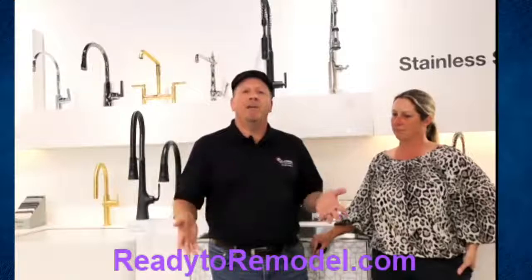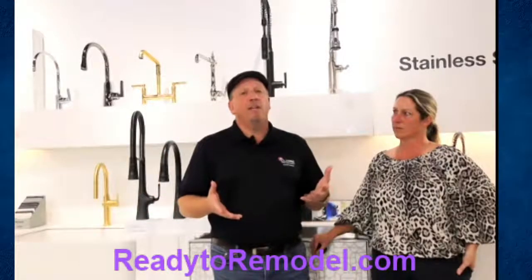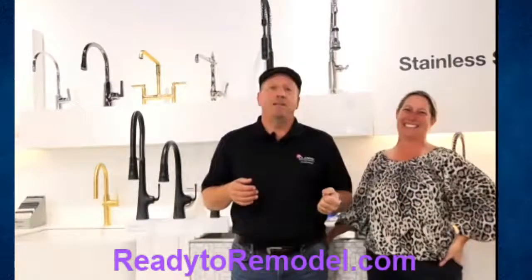So you could hire an architect, you could find an engineer, you could do the drawings, you could try to get your own permit, and then try and get all those people to do that. That's going to take you about a year and a lot of pain and anguish, or you could hire a design build contractor. Of course, I'm a little partial because I'm a design build contractor. But I'll tell you what the services they provide are: you're going to get the blueprints, the plans, and an interior designer to help you match all the colors. Look at everything we talked about today. They can help you with all that.